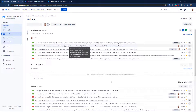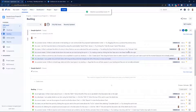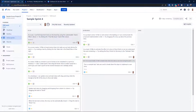An important note: I'm using the classic version, not the next-gen — I think they now call it team-managed. When creating a project, choose the classic template, which should be on the right-hand side. Create a few tickets, drag them into the sprint, and hit Start Sprint — otherwise you won't see tickets in the active sprint. That's a quick recap you probably already know.